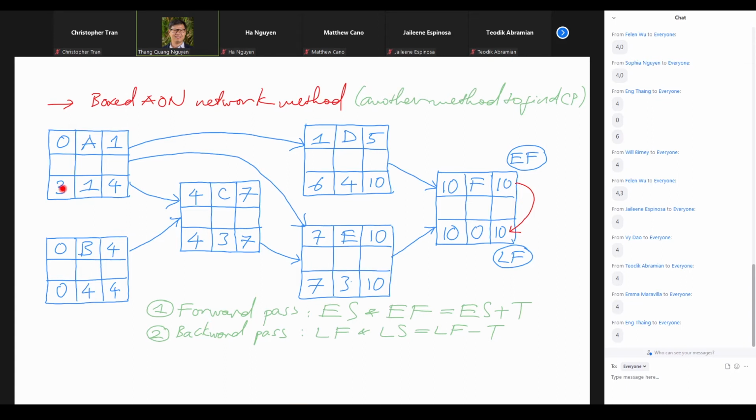The end of the 0 week as earliest. Now, the point of time right away is 0, right? If we delay that by 3 weeks, it will not change the project schedule, right? So it means that A is not on the critical path, right? That's a suggestion right there. A is not on the critical path. A can be delayed, but to some extent without affecting the project schedule. And that extent, that limit, is the 3 weeks, that we can delay A by.